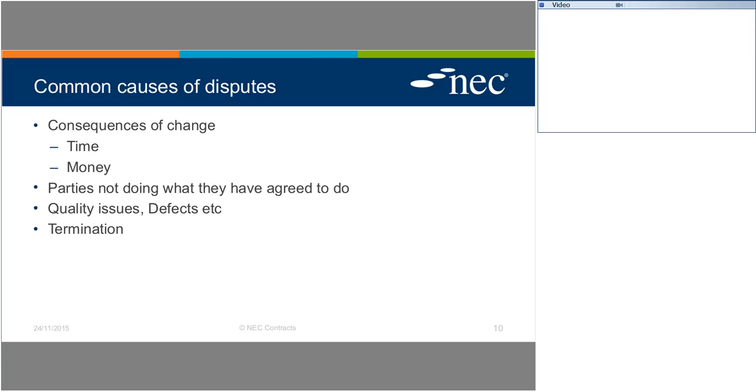I think what I take from this slide, Patrick, is a couple of things that jump out to me. One is the mention of the scopes, the good quality works information. The parties, effectively in NEC speak, act as stated, do the things that the contract asks you to do. I think 3 words that come out of a lot of works information related disputes are cut and paste. Where the works information has been drawn up from a previous similar project, and everybody does cut and paste. I do cut and paste. The sin in that situation is not getting it proofread properly before it becomes a contract document.